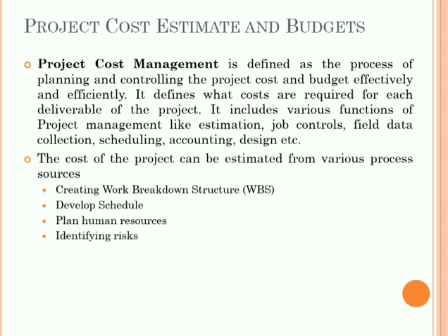The accuracy of the cost estimation and budgeting in project management depends on the accuracy and details of the project scope, which is the scope baseline. The scope will also define any constraints like date, resources, or budget. The risk register will help to calculate the estimated types of cost, the expenses behind the contingent action, and the expenses made to cope with the risks.